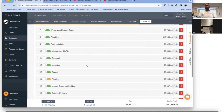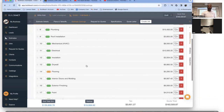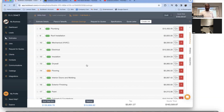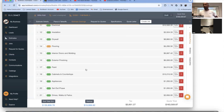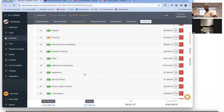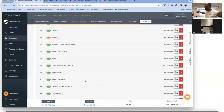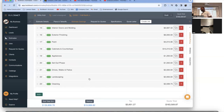Once all the roughs are done you do insulation, then drywall, then flooring and interior trim, then the first coat of paint. Then the cabinet guys come in, then appliances. Then you call everybody back for setouts — plumber puts in fixtures, electrician puts in light fixtures, mechanical connects the HVAC units. Then driveways, landscaping, and finally you clean the house up.